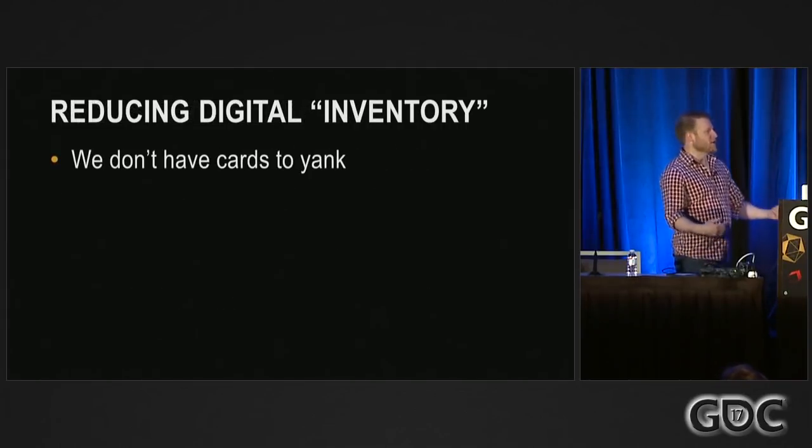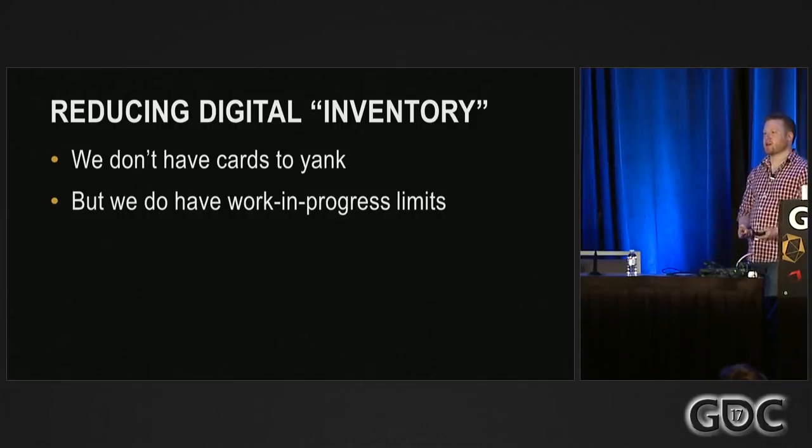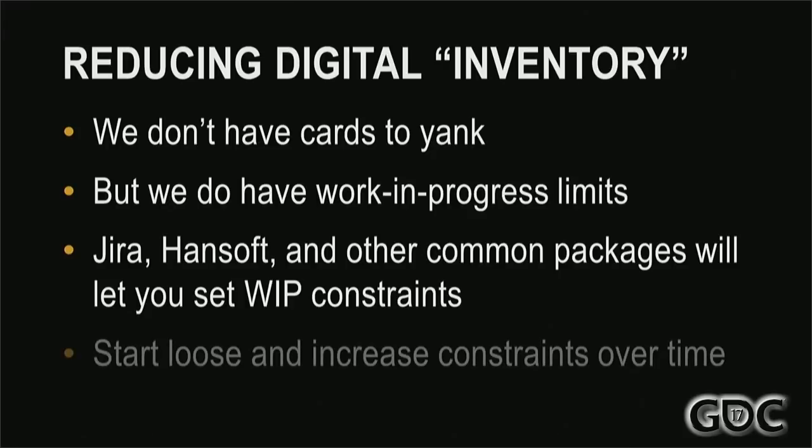Now, we don't have cars to yank, typically, in game development, but we do have work in process limits. Hansoft, Jira, a lot of those tools will allow you to set limits on Kanban flows to how much work anybody can have assigned. So if you want to take the Kanban approach, start loose and then dial in the restraints over time.